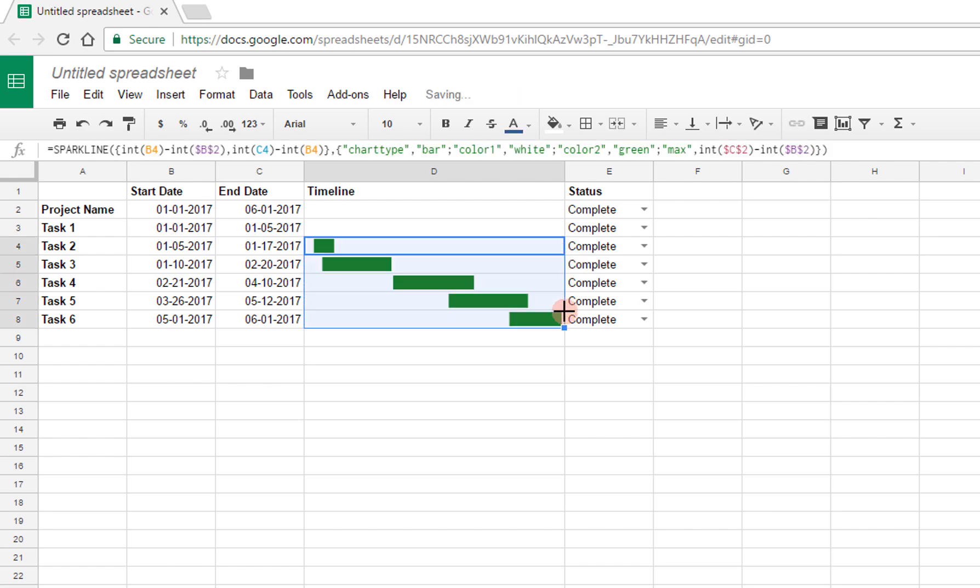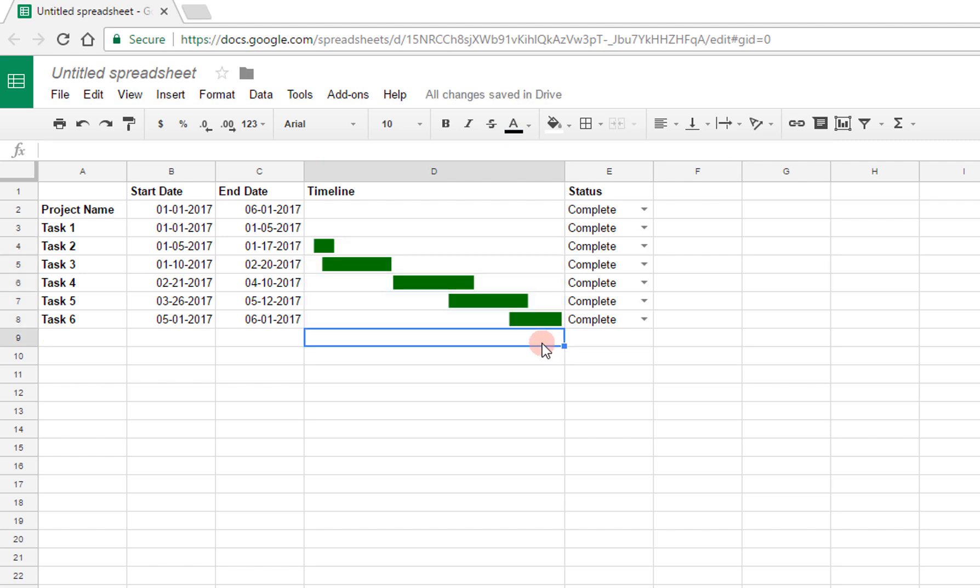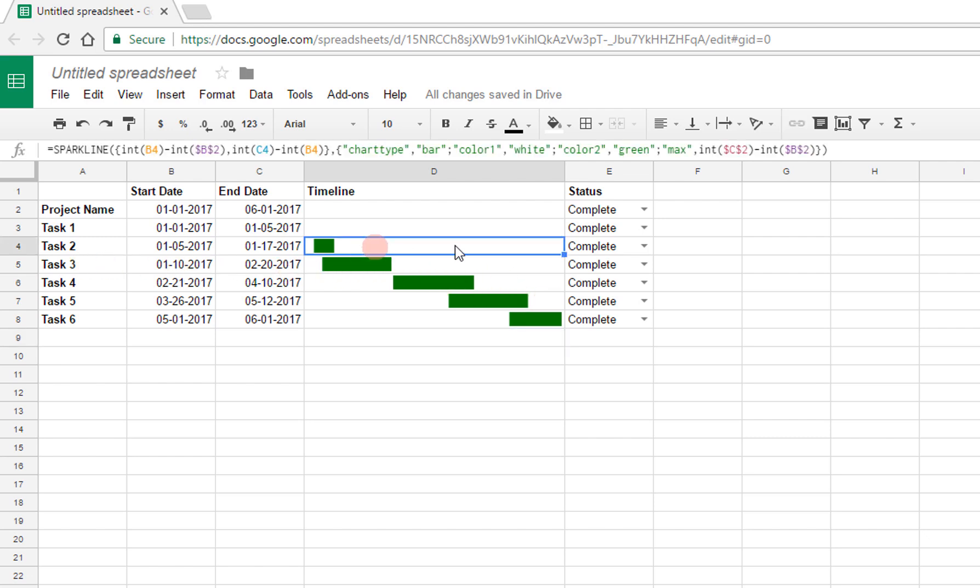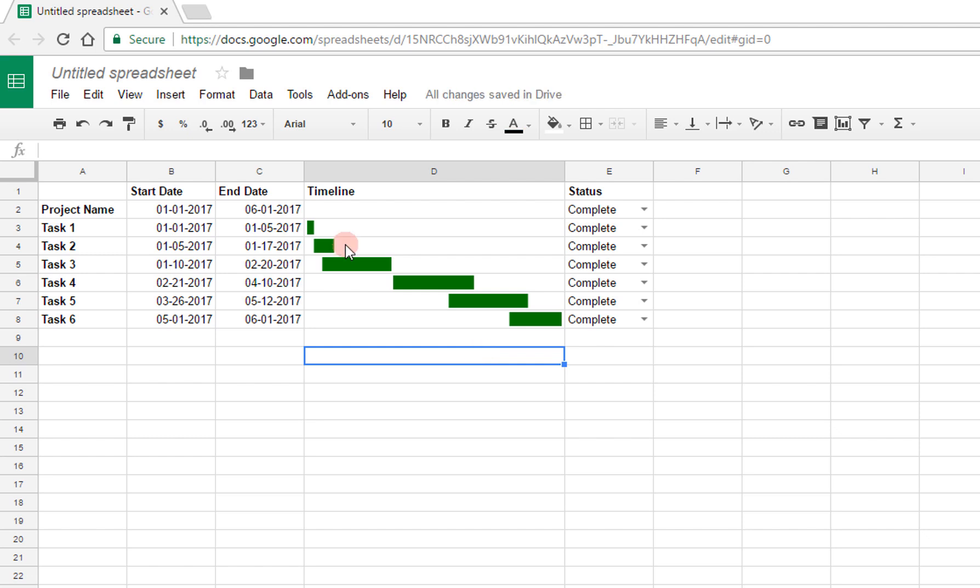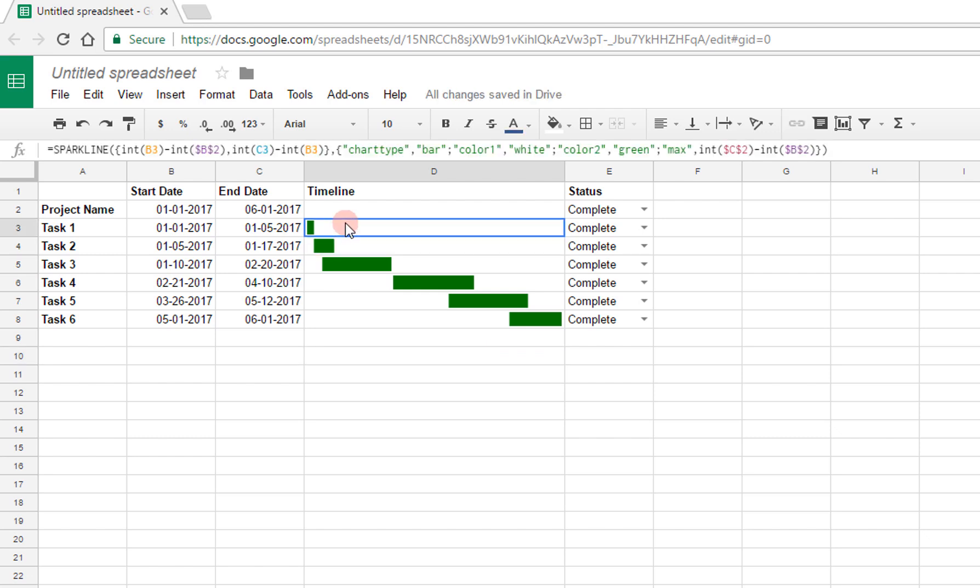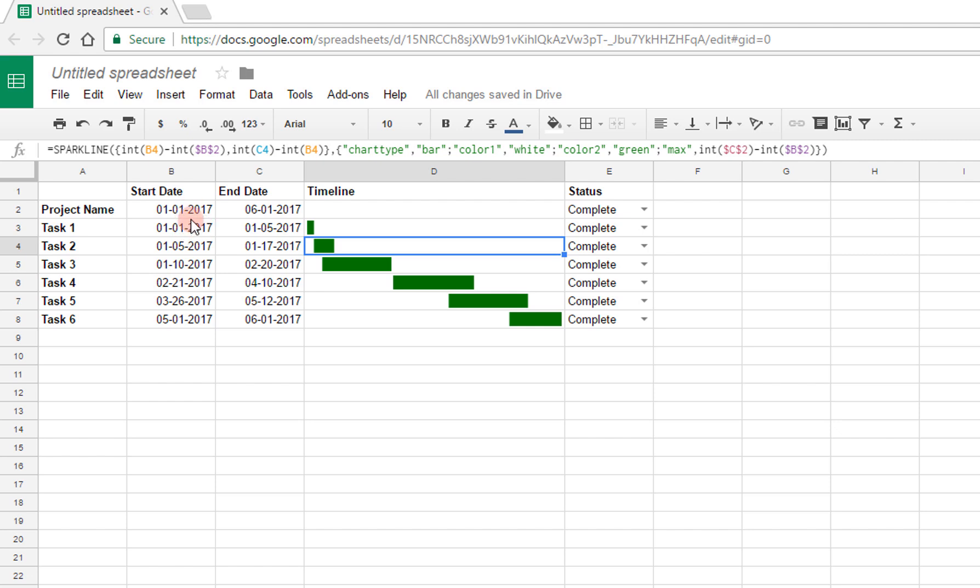And that's going to make it so that now the entire length of this corresponds to the length of the entire project, and now this is just a bar in that one location. So if I spread this to the other cells, then this already is starting to look like a Gantt chart, in the sense that each bar represents the duration of the given task nice and visually. Now the reason I started with the second as opposed to the first is because this calculation makes a bit more sense starting with the second one, because in the first one you'll be subtracting the same date from the same date and you're going to get a value of 0. But you could have equivalently started with the first one.